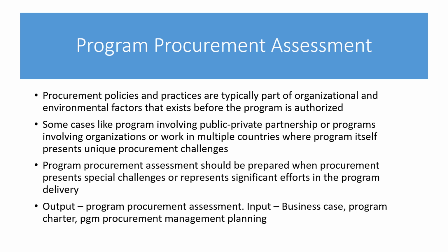For some cases, like a program involving public private partnership or a program involving organizations or work in multiple countries, that program itself presents unique procurement challenges. At that time you can build procurement policies within the program. But most of the time, procurement policies will cut across many programs and will be at organization level, right?